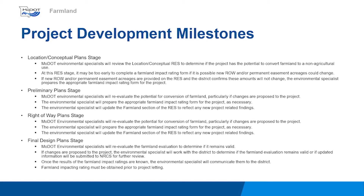Project letting must not occur until the farmland impact evaluation is completed. If conversion of or impacts to farmland has not yet been evaluated, the Environmental Specialist will determine if the project will convert farmland. If so, the appropriate farmland impact rating form will be prepared and submitted to NRCS. Once the results of the farmland impact ratings are known, the Environmental Specialist will communicate them to the district.